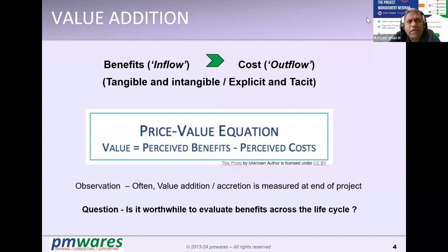Corporate philosophies have changed. You will see the measurements are being introduced throughout the life cycle. It's very similar to the quality principles which we have learned in PMP models, where we talk about quality assurance versus quality control. Historically, quality control was the only thing you talked about. At the end of the product being developed and tested, you looked at it. Whereas quality assurance talks about the entire process, the life cycle. At every stage, you do a check. Where are we? And you take corrective action.